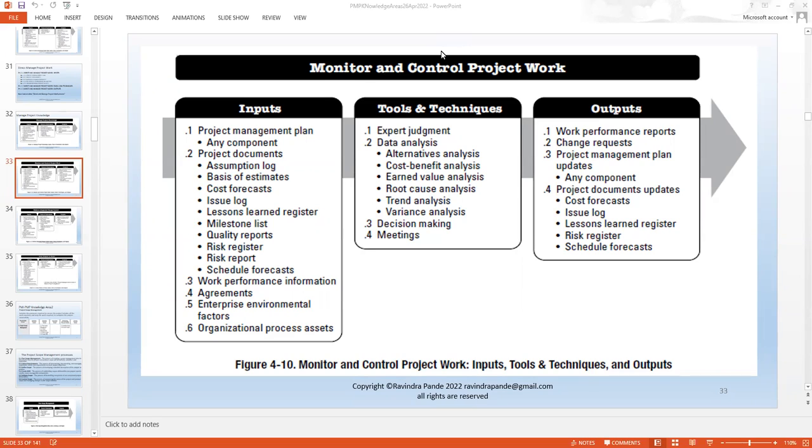Then we have different agreements, which are also taken as an input in case there are any penalty clauses for delays or something like that sort. Then that's a kind of additional risk I need to tackle there, because I don't want to pay any penalties or fines for delays, right? So I might add extra resources just in case. And many project policies and procedures support project managers to have an extra resource called a bench resource. Now, these bench resources are normally with the popular skills which you normally require, but for something like exceptional skills, you might not have a bench resource.